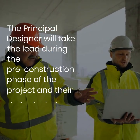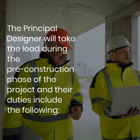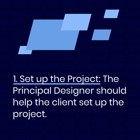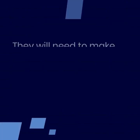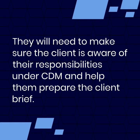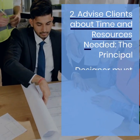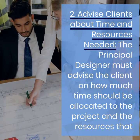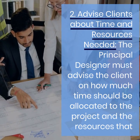The principal designer will take the lead during the pre-construction phase of the project, and their duties include the following. First, Set up the project: the principal designer should help the client set up the project, make sure the client is aware of their responsibilities under CDM, and help them prepare the client brief. Second, Advise clients about time and resources needed: the principal designer must advise the client on how much time should be allocated to the project and the resources that will be needed.